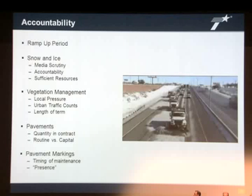Okay. Snow and ice, which again was handled in our performance-based total maintenance contract. We have since, actually, I might mention, gone ahead and change ordered that out. We felt like failure simply was not an option during a snow and ice event, due to media scrutiny and the fact that we are ultimately accountable for our facilities. We never really knew if the contractor had sufficient resources until potentially it was too late. So we all made a determination it was probably advisable for us to go ahead and field change snow and ice out of our contract, and we elected to handle it with our in-house forces.